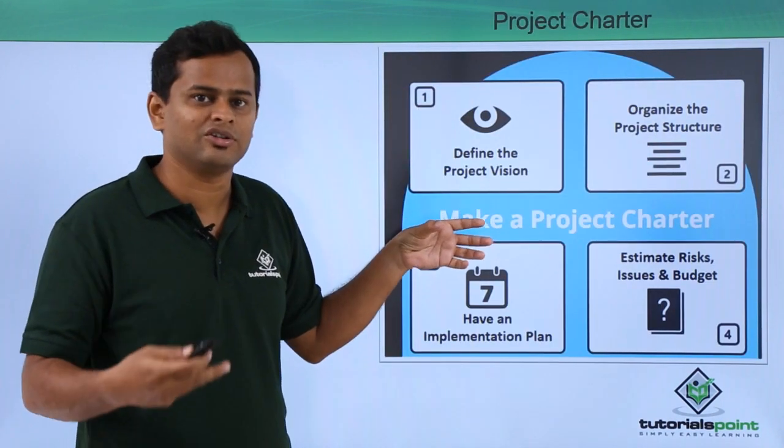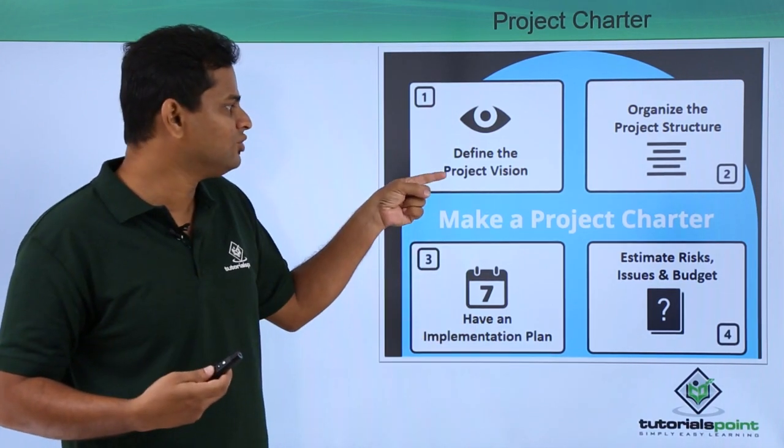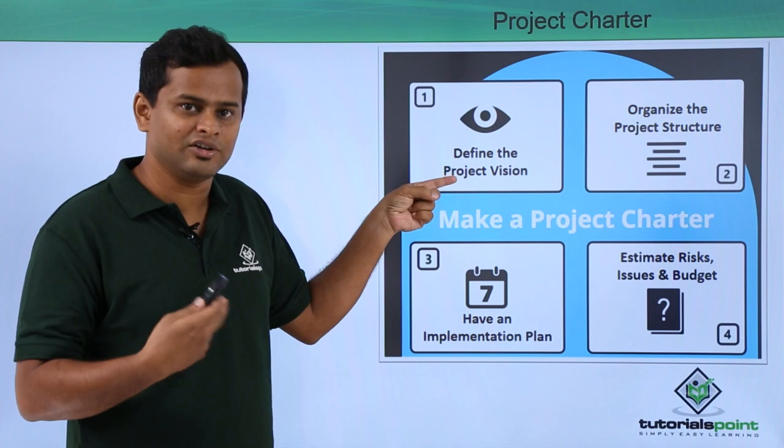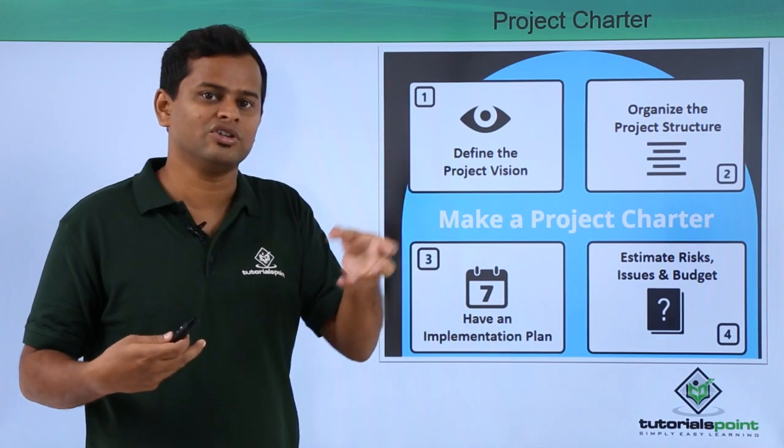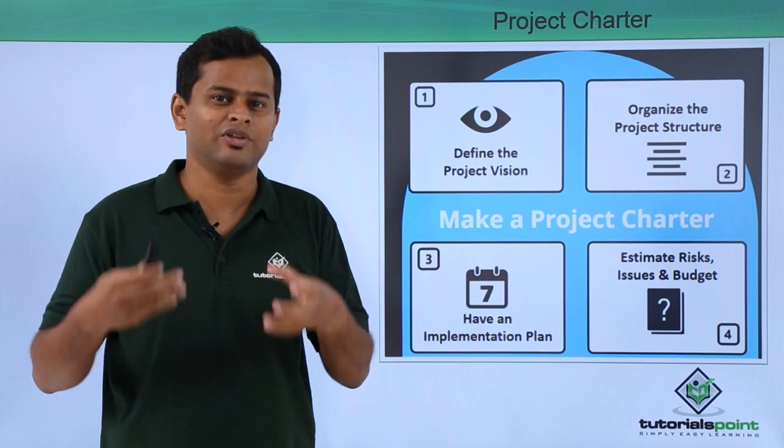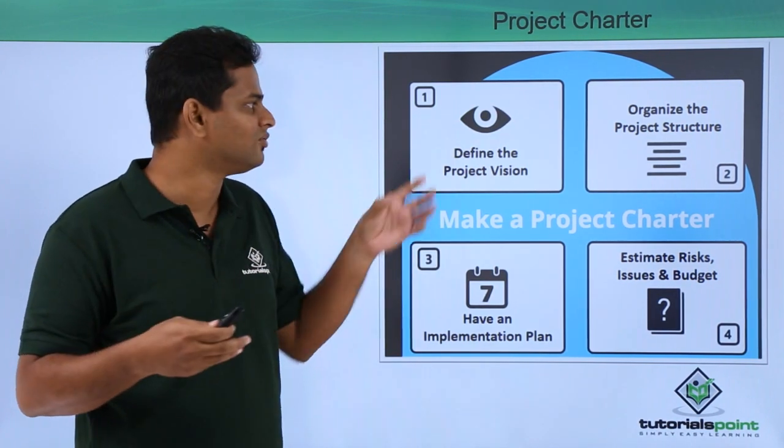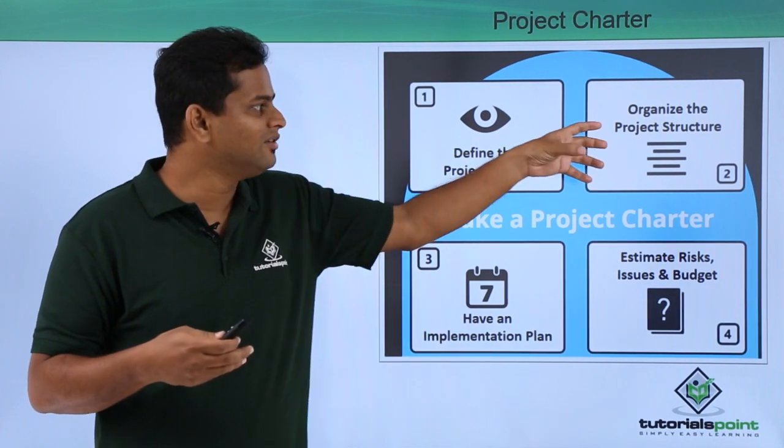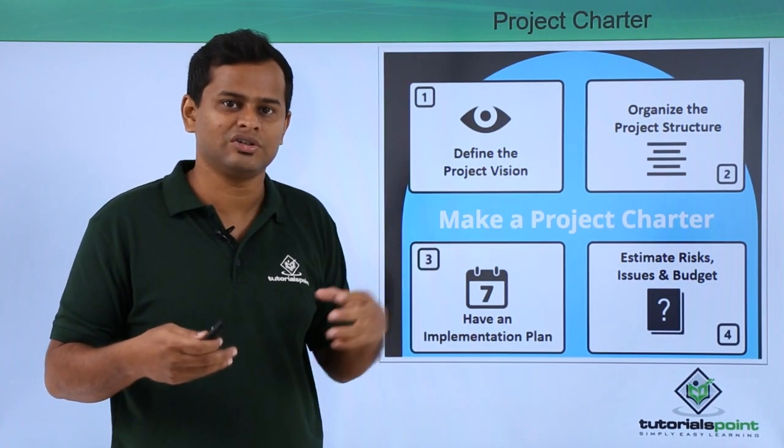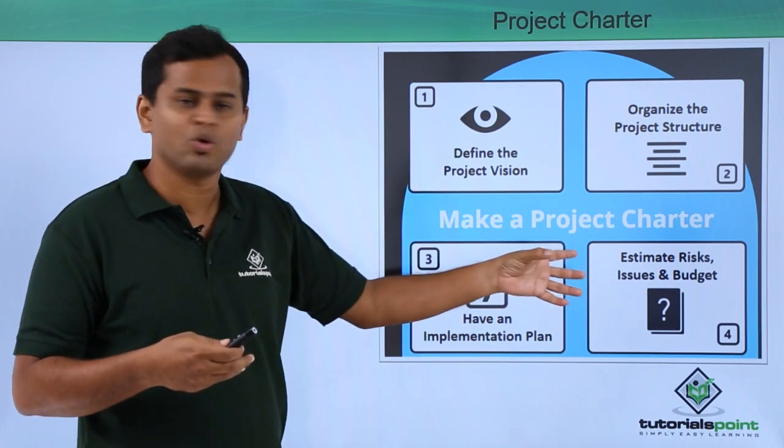This is an example of a project charter, however it can vary depending on the project. We need to have a project vision clear, like what we want to achieve, where we are going towards. The complete project team needs to get their buy-in and agreement. Then we need to have a typical project structure like whom to report to, the budget, and what are the risks anticipated.